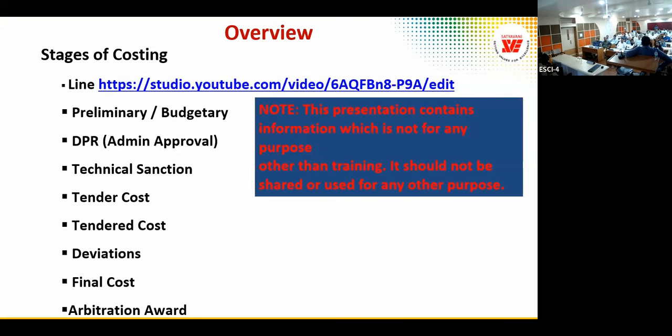And the department could not take a decision on that and kept it pending, and time lapsed by 10 or 15 years. And then the ministry asked the auditors. The contractor made a claim of 250 crores in damages because of non-response from the department after receiving 100 crores. The 100 crore was a mobilization advance. Was interest paid? Lot of mobilization advance. Yeah, I have seen some contracts where the advance was paid with 8% interest, sir.